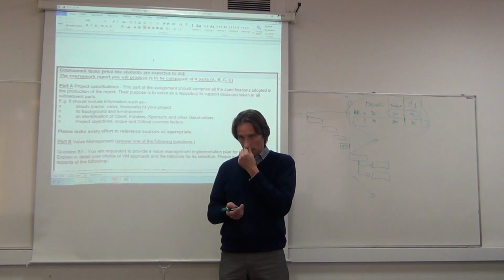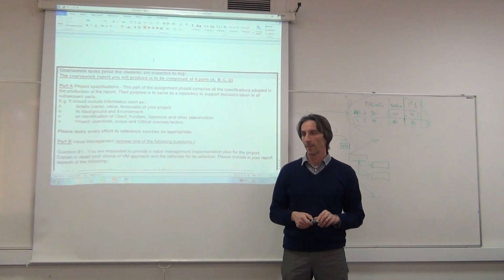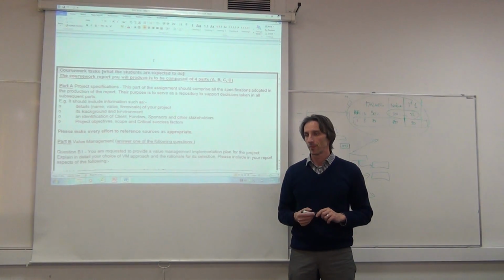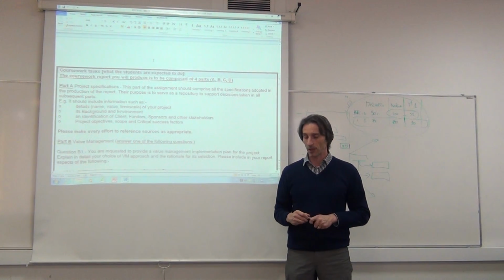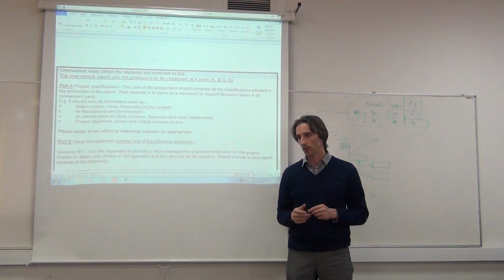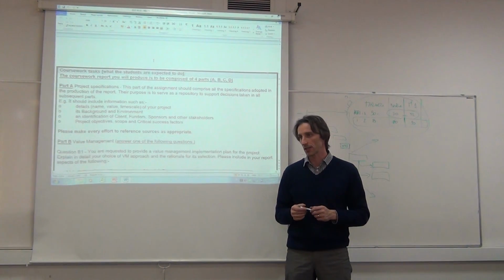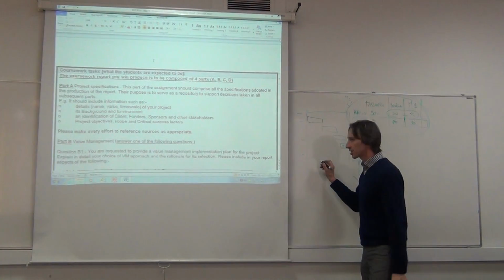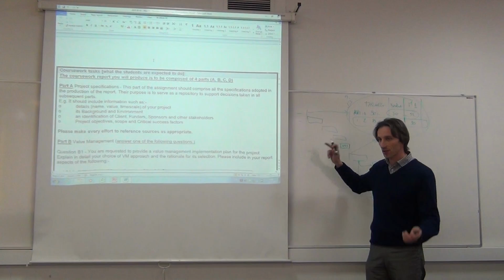A couple of weeks ago we were talking about an imaginary project, and we said the weather, depending on what country it is, could have an effect on the time you might need to plan around, what season it is, or stuff like that. So is that where it might come in, if your project's in a certain country? Is there a risk? Yeah, that would be part of the risk analysis, right? If you have a risk register that doesn't consider that you might end up without water if you're in Arizona.